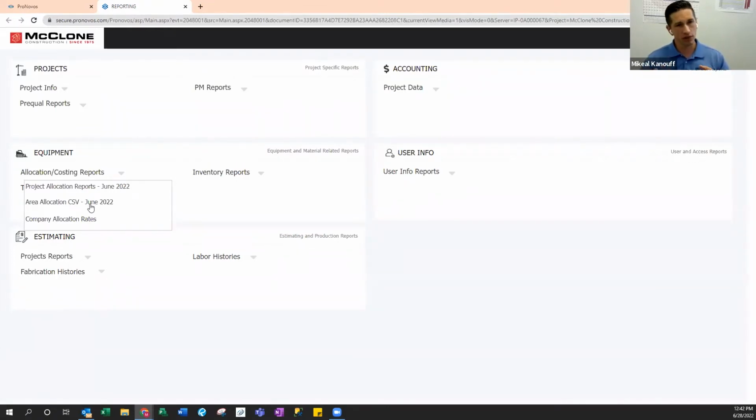The report looks different because the view of the reporting is modifiable. We create the information so that Sage can receive it. We add some cost codes to it. We add the project number to it. And there's a one-click button on that export that our CFO takes, imports that information into Sage, and costs it to the job.